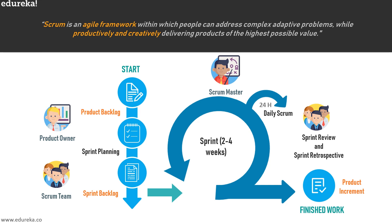The product owner, scrum master, and team together create a list called the product backlog. They pick up a few tasks from the backlog and put them in the sprint backlog to work on during the sprint. After the sprint is done, that working product is sent for review or feedback, and the same cycle begins again. During the sprint, different kinds of meetings take place: sprint planning, daily scrum, sprint review, and sprint retrospective.